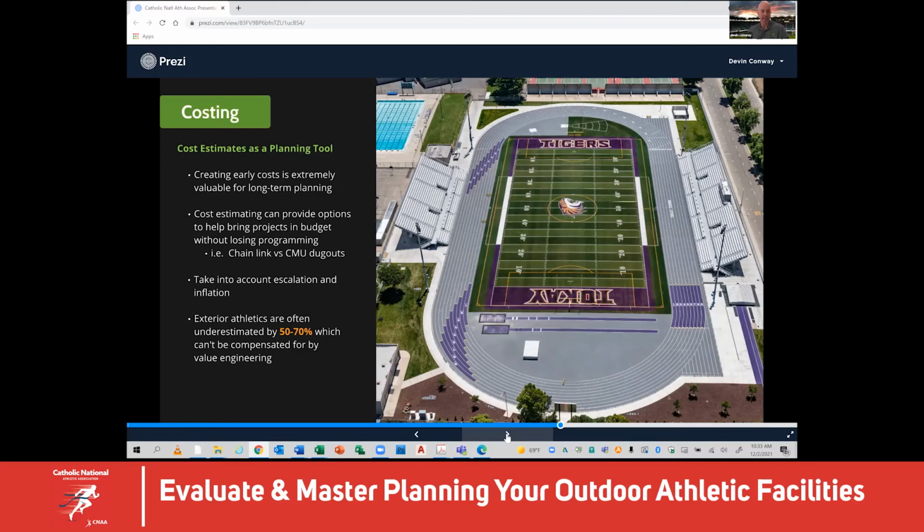The turf cost per square foot's the same, but the prevailing wages for those installers is very, very different. And those are the things you just have to make sure your design professional has a really good handle on, especially if you're going to try to hire someone from out of the area. They have to know and do some due diligence on that.